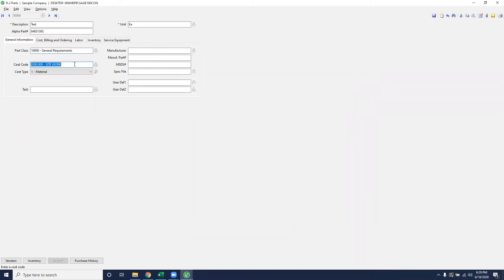With this part, you'll want to assign a cost code so that when you create your budget, all of the like items under the same cost code are grouped together for budgetary reasons. You'll have already selected a cost code that is where you want to group the value for this part. If you haven't set up cost codes, that will be where you want to start.